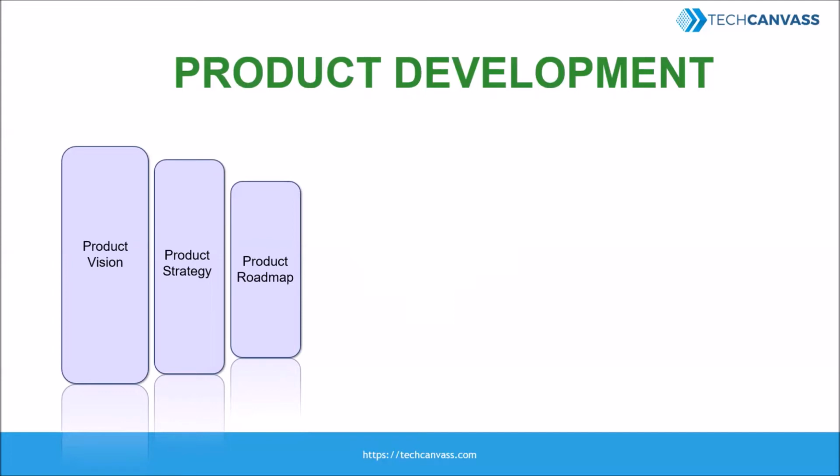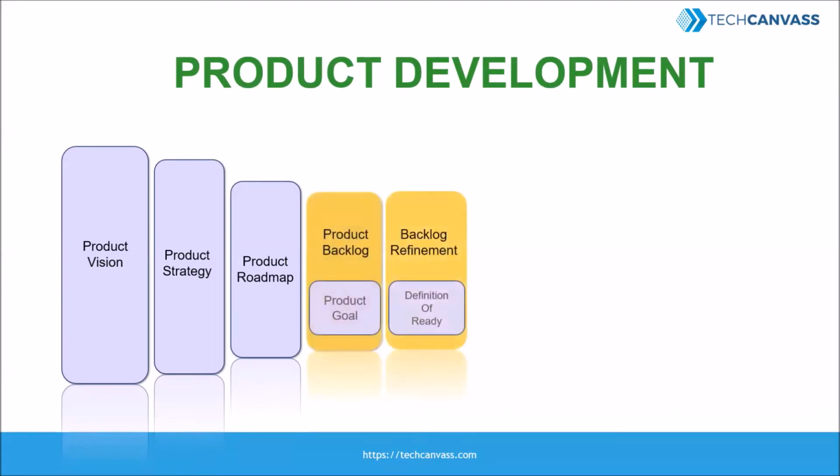Next, the product roadmap on how the milestones for the product are decided. What will be the minimal viable product or minimal marketable release or minimal marketable product. Release planning is based on these identified feature releases. From this point, the Agile framework gets introduced for development.